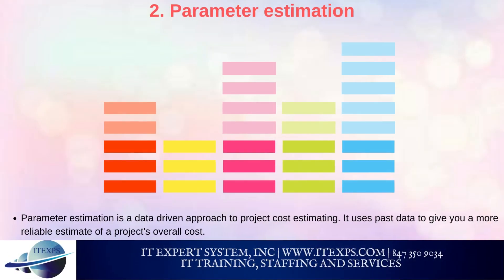Method 2: Parameter Estimation. Parameter estimation is a data-driven approach to project cost estimating. It uses past data to give you a more reliable estimate of a project's overall cost. First, calculate how much time will be spent on each task on your list. Next, add a cost figure by multiplying the hours of each task with each team member's hourly rate: task duration × employee's hourly rate = task cost. Once you have calculated the costs for every task, add them all up to reach an estimated total. Although this method is more time-consuming than a ballpark figure, it's also more accurate. It works best for projects that have concrete start and endpoints for tasks, like social media management.